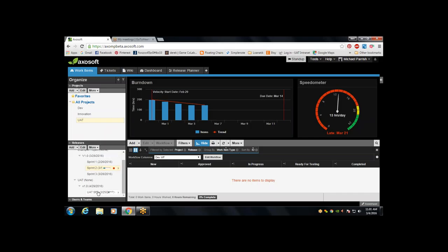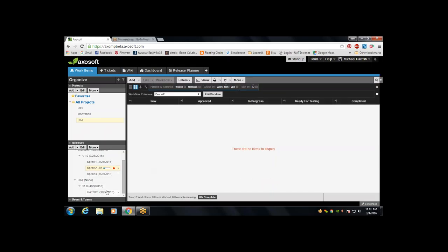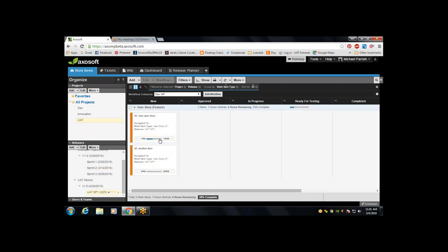Project, release, broken down into either version and sprint, or just go straight to sprint. The work itself that you're going to have in the sprint, and then estimating against the items themselves. So when you create an item, right at the point of creation, just give it some vague estimate. It doesn't have to be exact, but just what you think it's going to take to accomplish that.